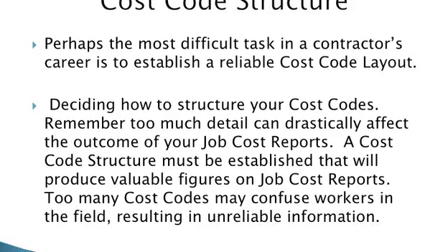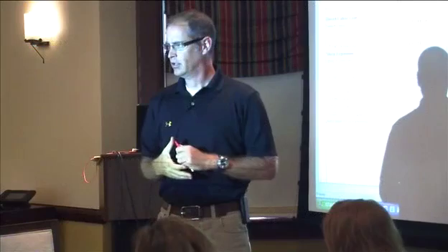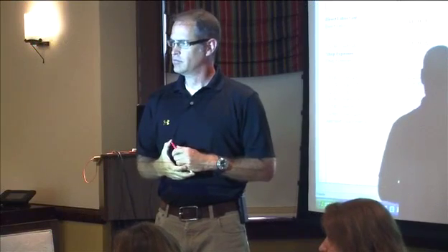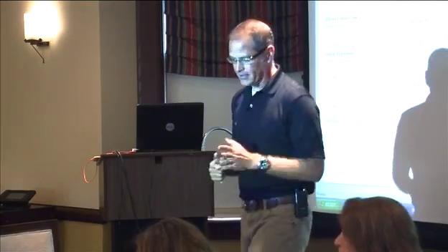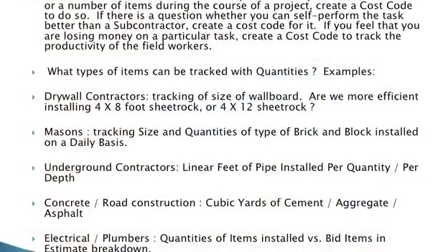You can have 10 cost codes, you can have 1,000 cost codes. If you're working for the state, you have the potential of having multi-thousands of cost codes, right? Because your cost codes are probably designated by the line items that they've got in the ODOT book, which they'll change on a whim. So don't commit any of them to memory. On the other hand, when we look at cost code structure, the question is what can be tracked, and what can be tracked reliably?